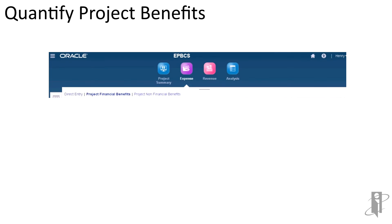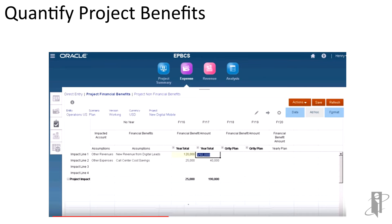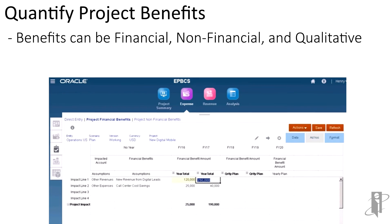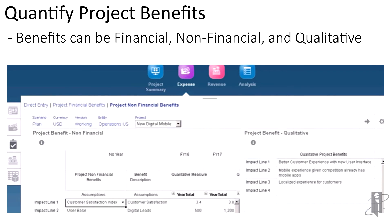Now I want to be able to explain to someone why they should approve this project, so I can list the benefit they're going to get. A benefit could be a financial benefit — in my case, I think I'm going to generate $150,000 of additional new revenue based on this project, and I'm going to save $25,000 in 2016 and $40,000 in 2017. There might also be non-financial benefits: I think it's going to increase customer satisfaction, give a better customer experience, a better mobile experience, and a more localized experience. It will also generate more digital leads. I might also have a qualitative benefit that I could put in as well.